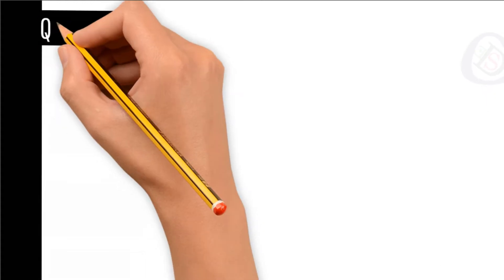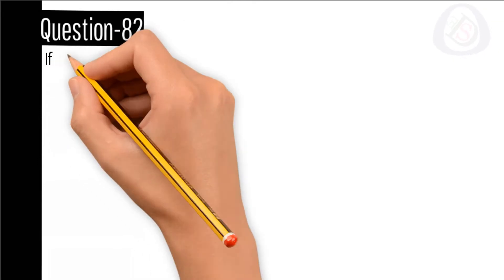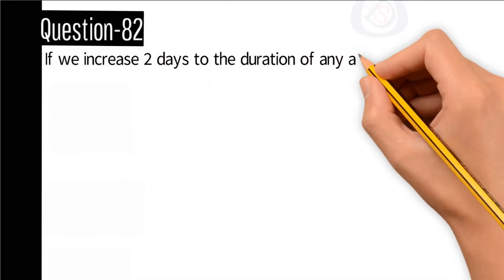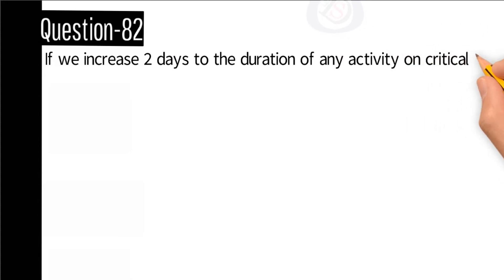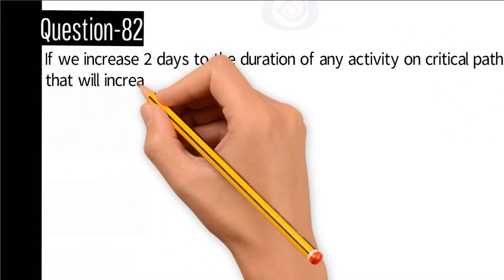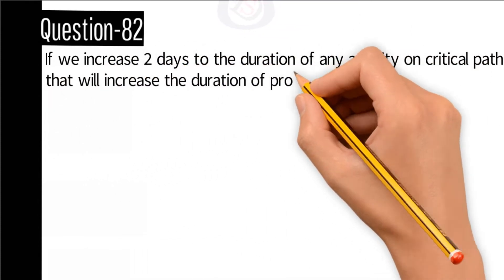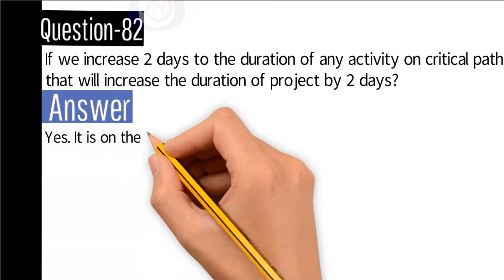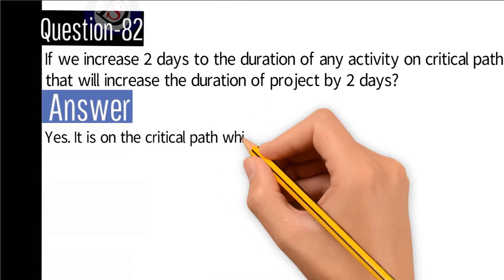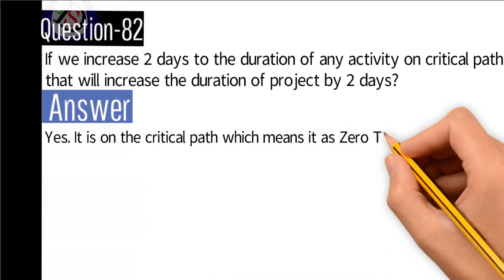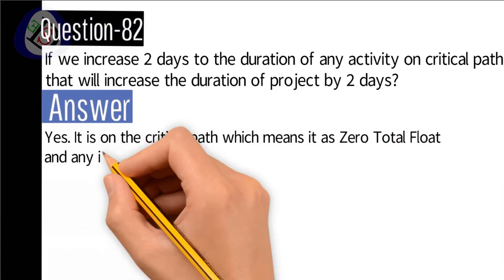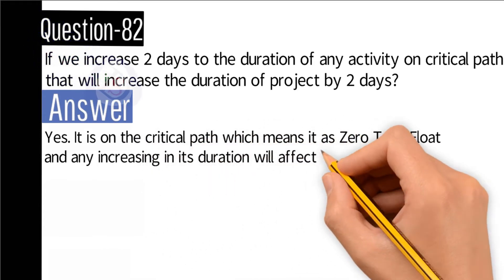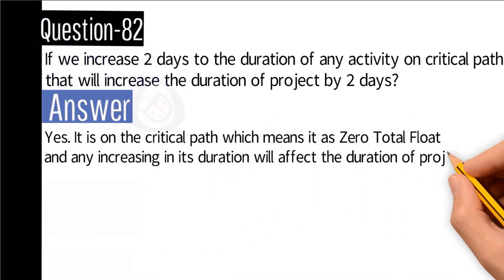Question number 82: If we increase two days to the duration of any activity on the critical path, will that increase the duration of the project by two days? Answer: Yes. It is on the critical path, which means it has zero total float, and any increase in its duration will affect the overall duration of the project.